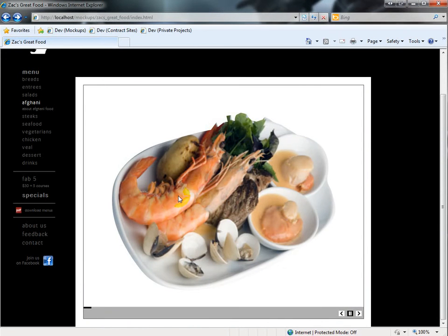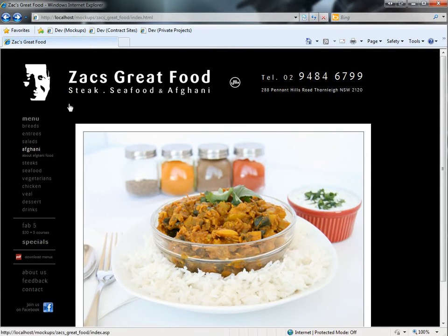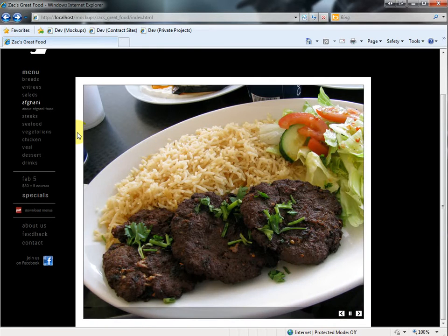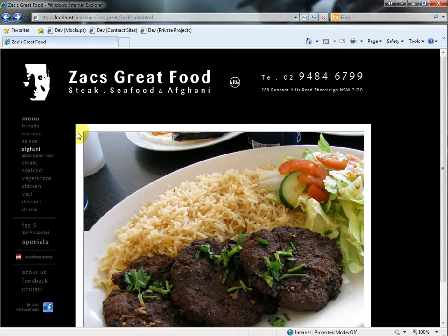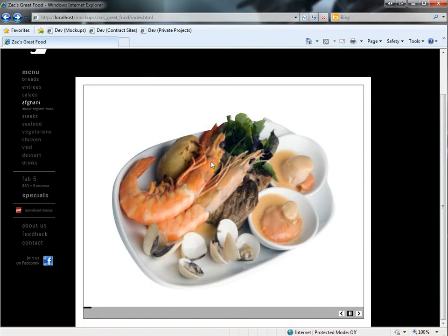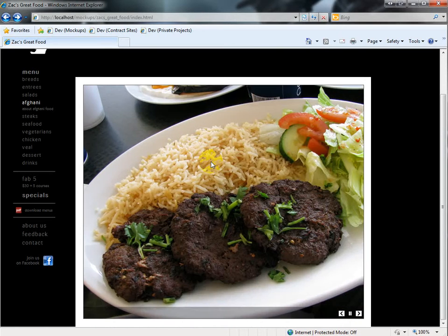The reason why I'm talking about this is because that budget is fully utilized for this additional feature. During the course of this project, be very, very mindful and cautious about new things which Ray asks for. This is one of the reasons why this tech briefing is being given to you, and why it's going to be quite lengthy, because what I talk about in this video is generally what's approved. If he asks for something different, you need to check that with me.